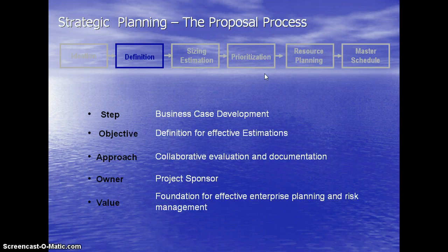The next step includes the collaboration effort of gathering the input, organizing the approach, defining the benefits. The objective here is to define the idea well enough so that a reasonably accurate estimate can be made on the development, implementation, and ongoing cost of the change. It's tough to get a useful estimate with an idea like, build me a new house. However, a floor plan with wish list, lot location, and style now provides some granularity, and an architect can provide some information and figure out the right questions to ask you to make that estimate more accurate.